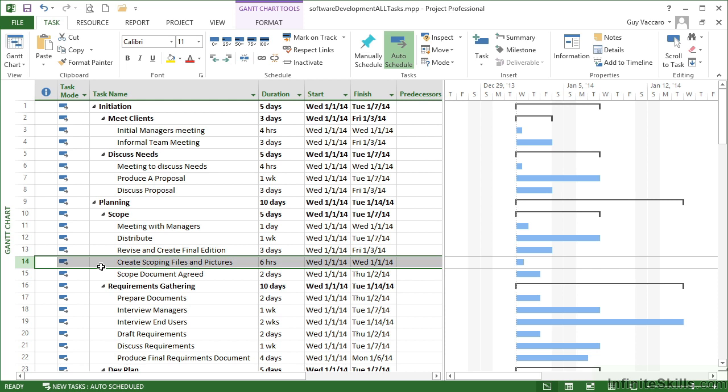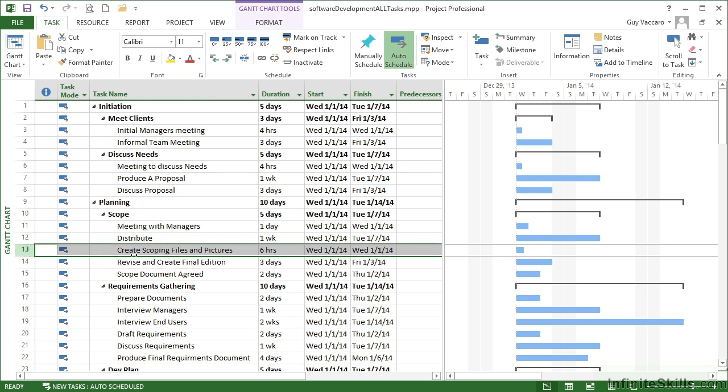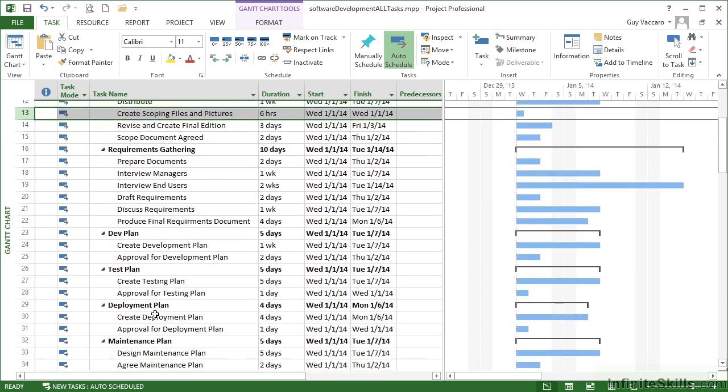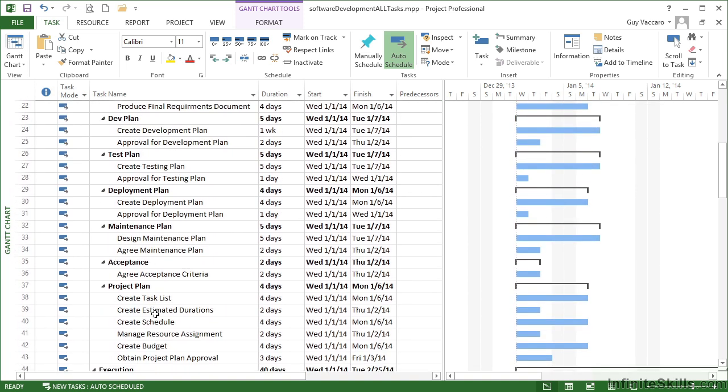So effectively my task now has a different number and the two that moved up also now have a different number, but any relationships that have been created, which we have none as yet, they would still be maintained. However, I would certainly advise not really moving tasks once you have the Gantt chart in place, because the arrows over here can then start to get very untidy and messy and hard to read. So any moving that needs to take place should be at this sort of stage now where we're building the project plan. We've got the tasks in there in a sort of roughish chronological order, but you might feel that they're not quite, in which case you can just grab and move them around.